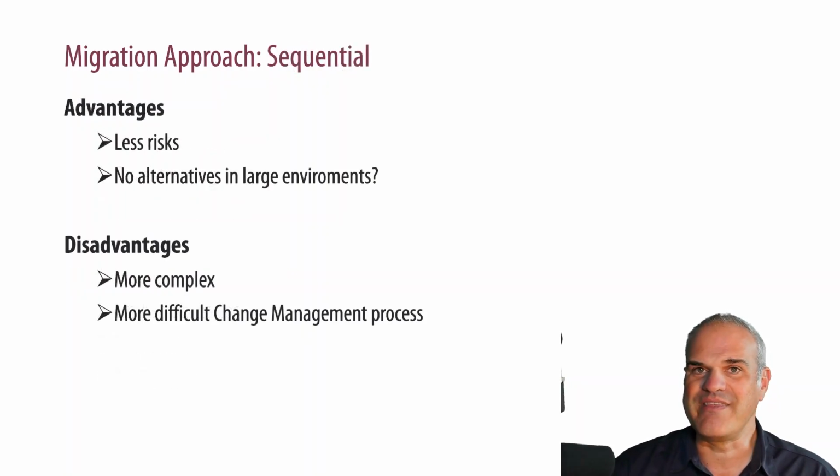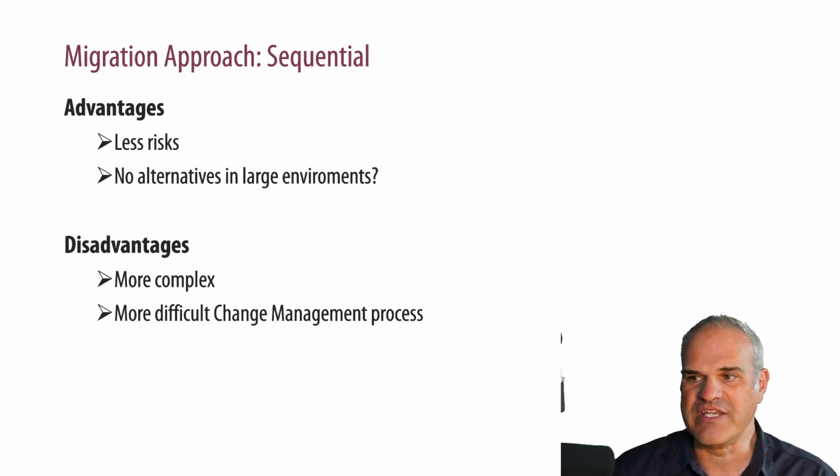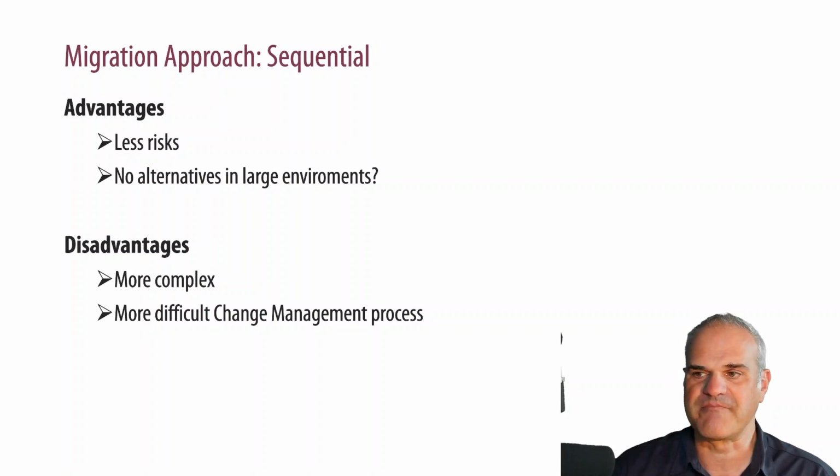Next approach would be the sequential approach. Disadvantage, it's much more complex, and you definitely need change management here. But the advantages, in large environments, you need to migrate step by step, like Exchange, OneDrive, SharePoint, Teams, and so on, step by step, and then you have less risk.